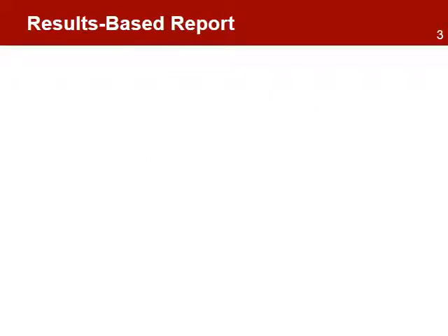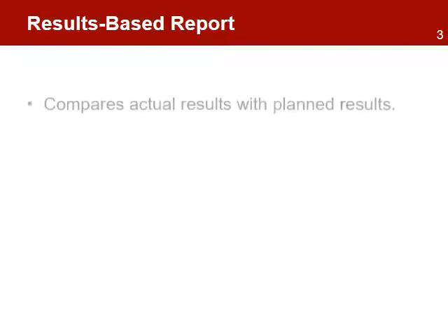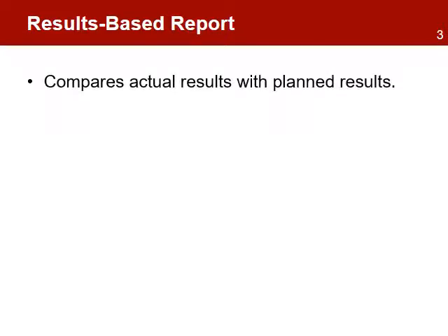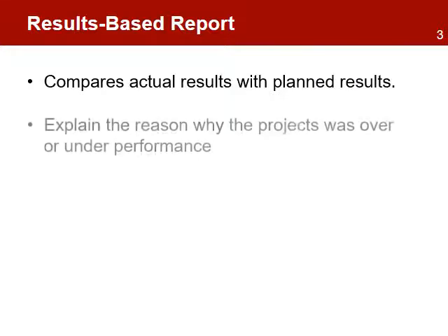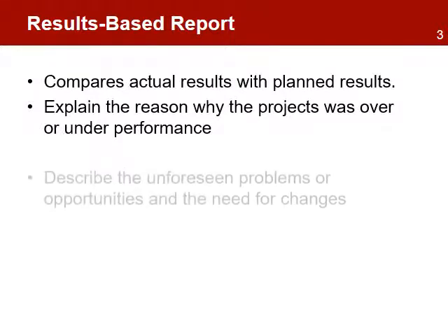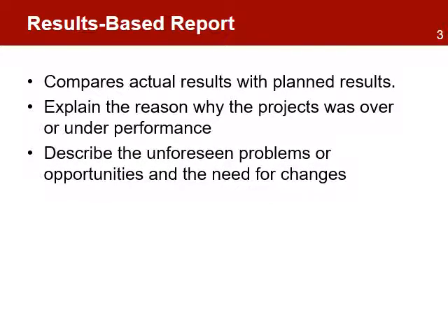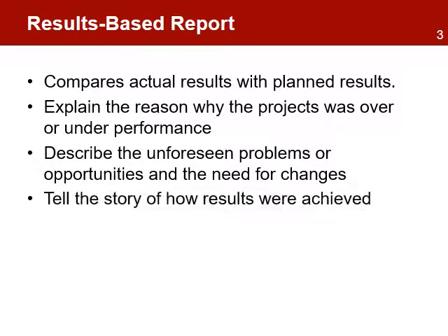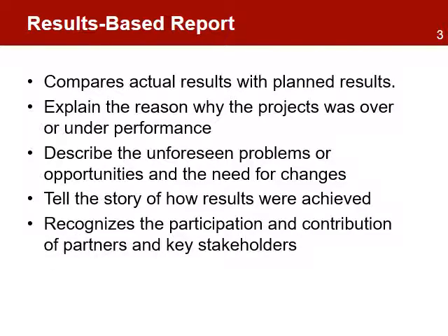Good results-based reports have the following characteristics. They compare actual results with the planned results. They explain the reason for over or underperformance against the planned targets or milestones. They describe the unforeseen problems or opportunities and the recommendations for changes. They tell a story of how the results were achieved, identifying lessons learned. And finally, they recognize the participation and contribution of partners and key stakeholders.